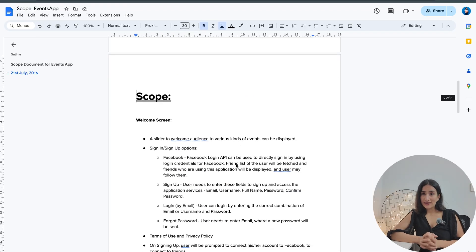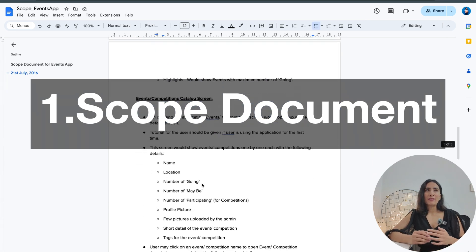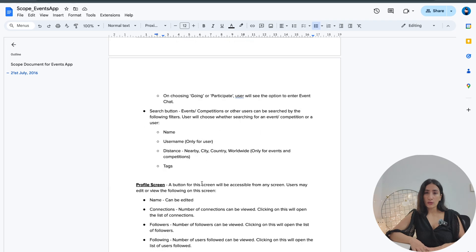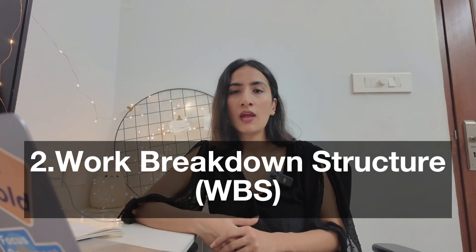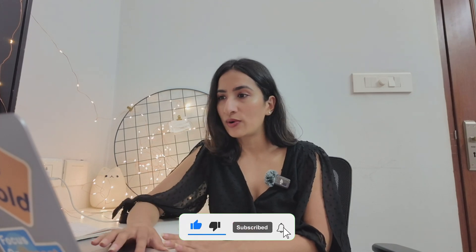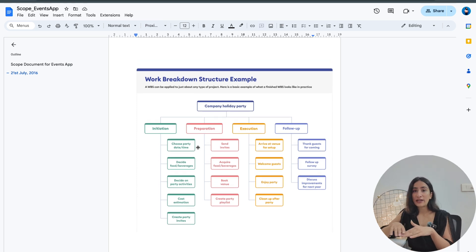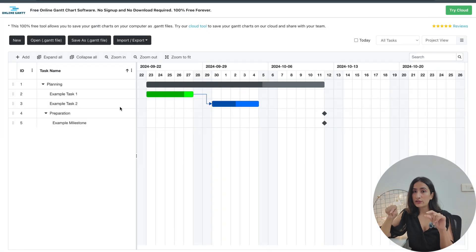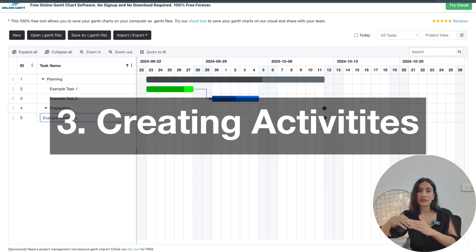The first step to creating a Gantt chart is to know the scope of everything that is going to happen. A scope document can be something very simple in a Google Doc, and I would also suggest learning about the Work Breakdown Structure — it's a more formal way of doing the scoping. Let's say we're talking about the event: if I put it in a Google document it will look something like this. This Work Breakdown Structure has the different categories of work and a list of all the activities under each category.